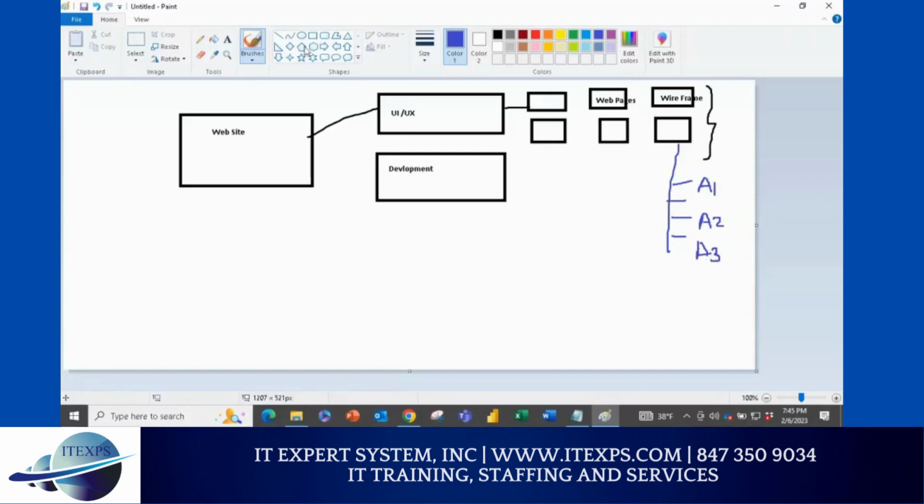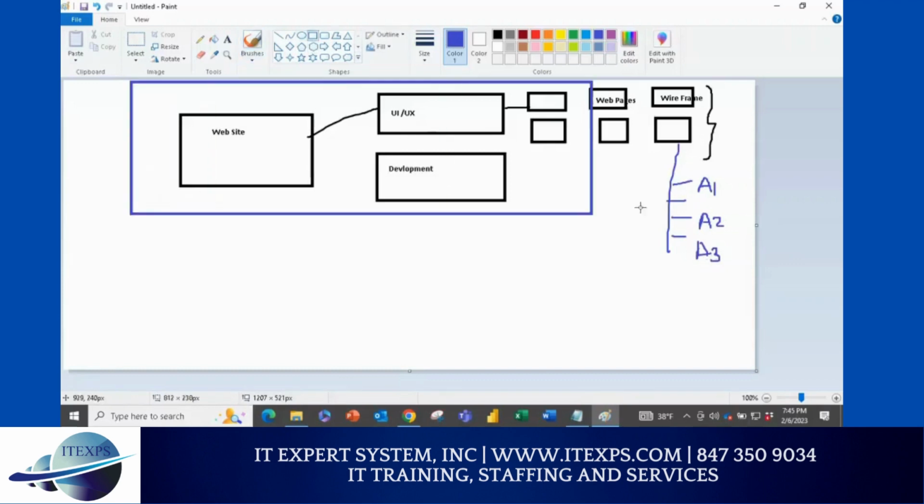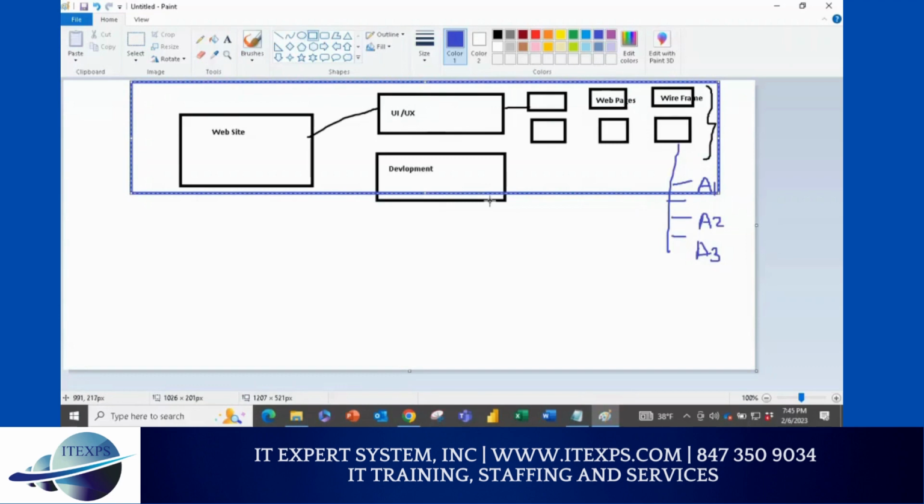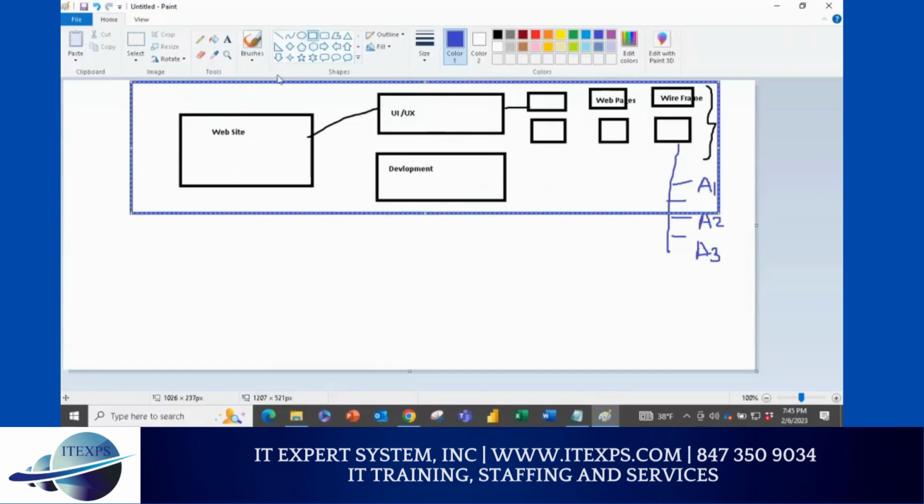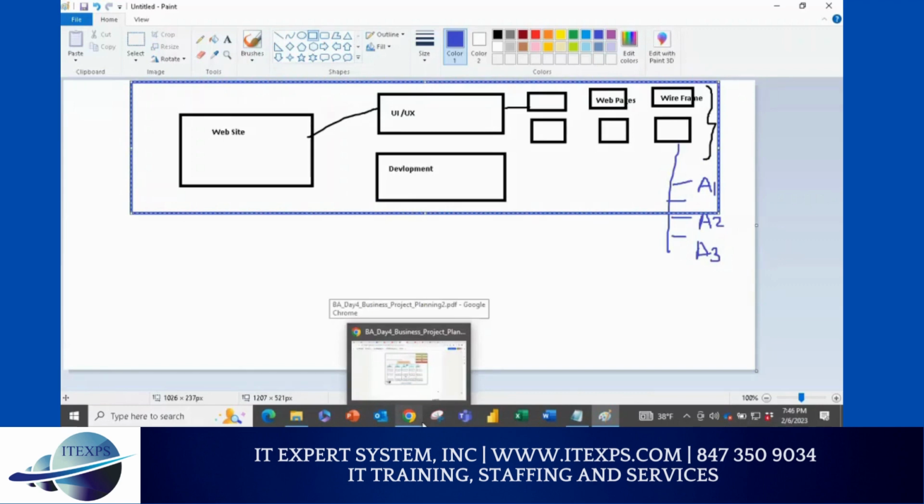So when you talk about WBS, you talk only up to the work package. Make sense or no? Now, what is a work package? It's a collection of activities, but you are not going to grassroots level, 2 hours, 4 hours, 6 hours. You're going up to 32 hours or 40 hours like that. Why? Because you don't want to go to grassroots level.